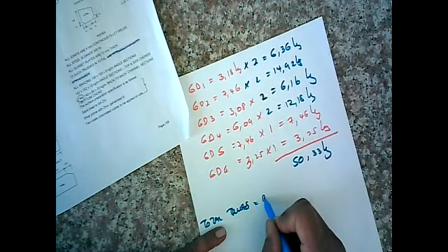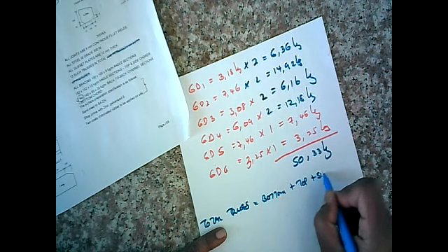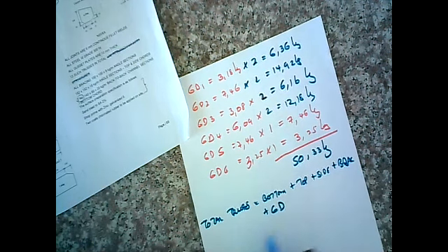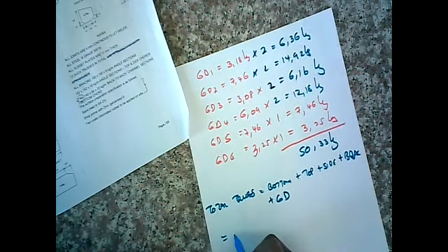Right, so to end, total truss, the bottom chord plus top plus side plus bracing plus gusset details. And we get a value of 320 plus 216.28 plus, what's this one? 131.52 plus 50.23, and it gives us a total of 718.08 kgs per truss. But the question says we have 13 of them, and if you multiply that, it comes to